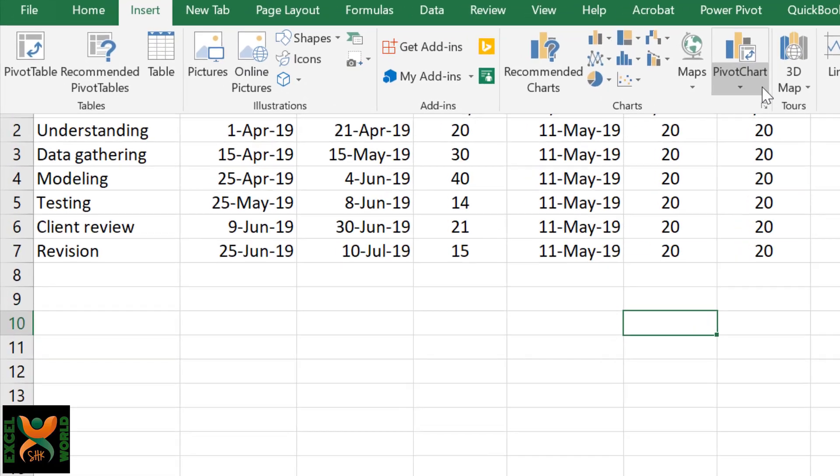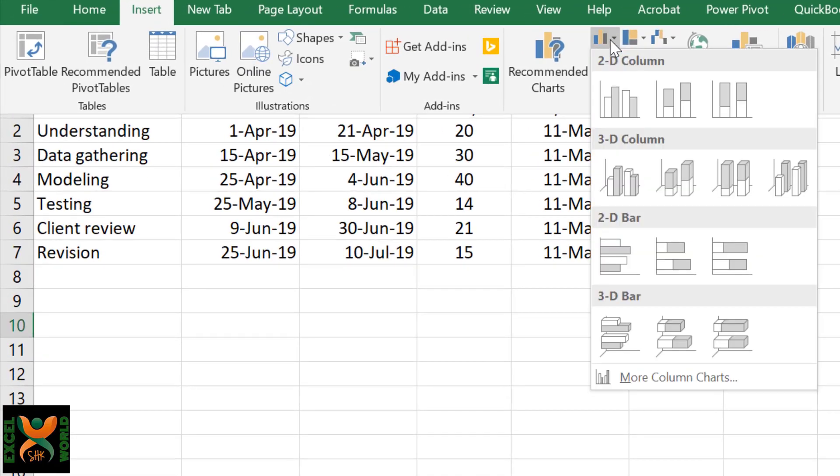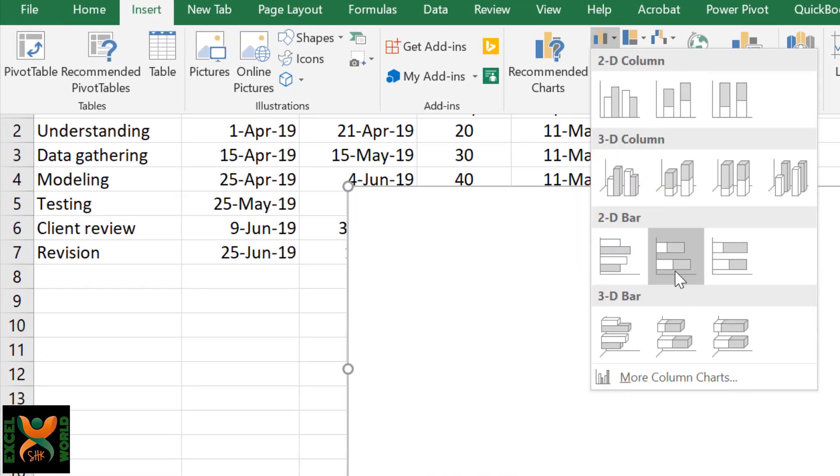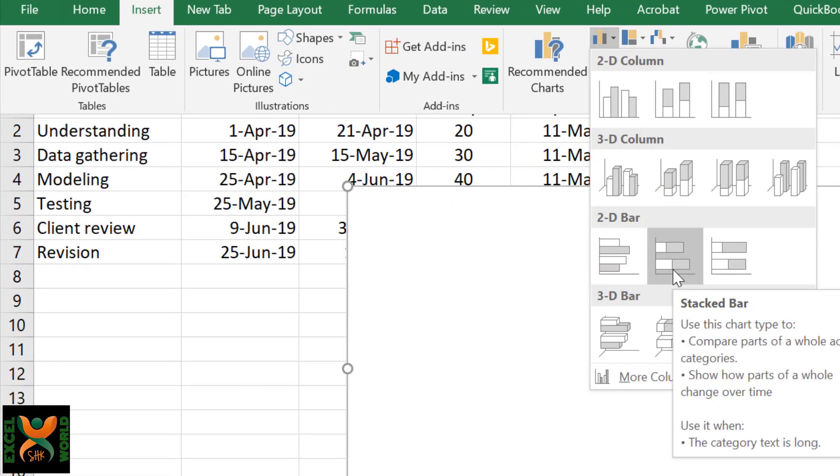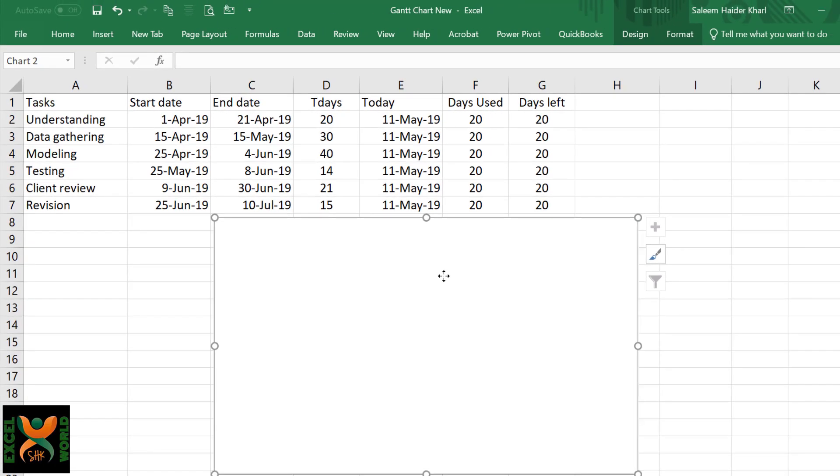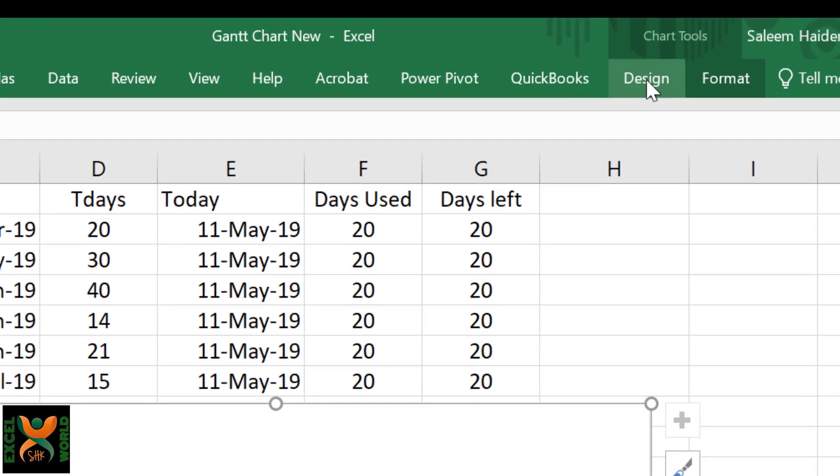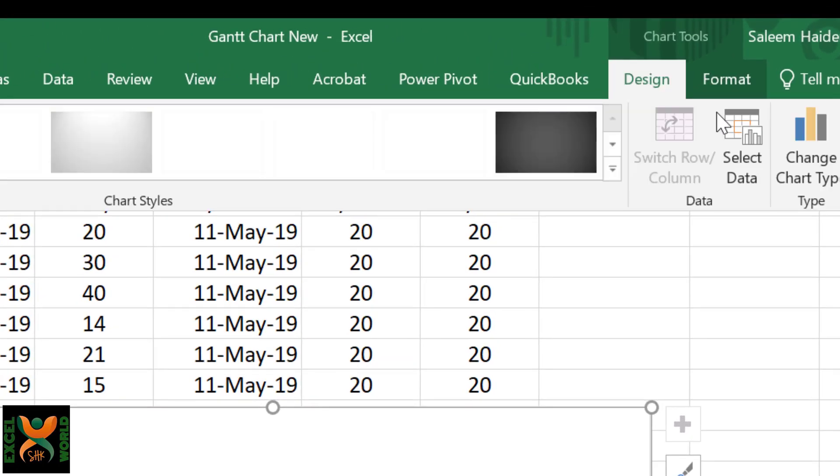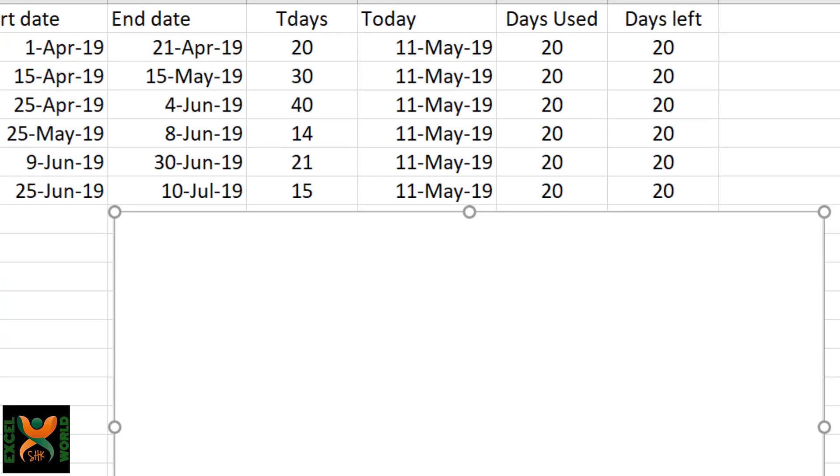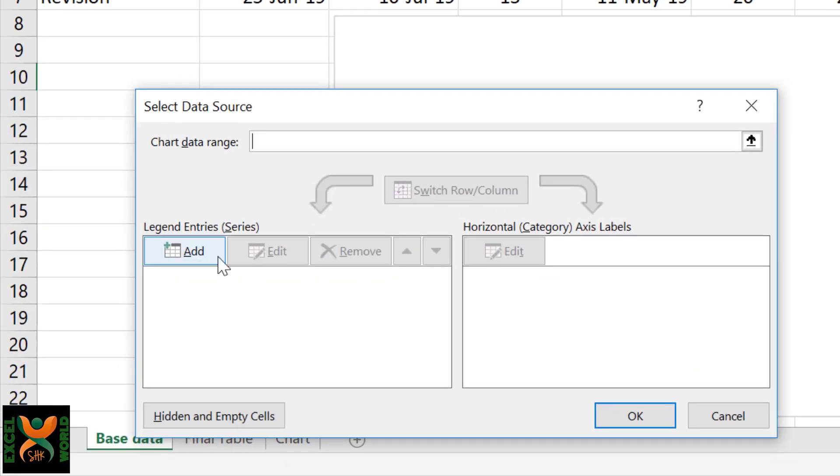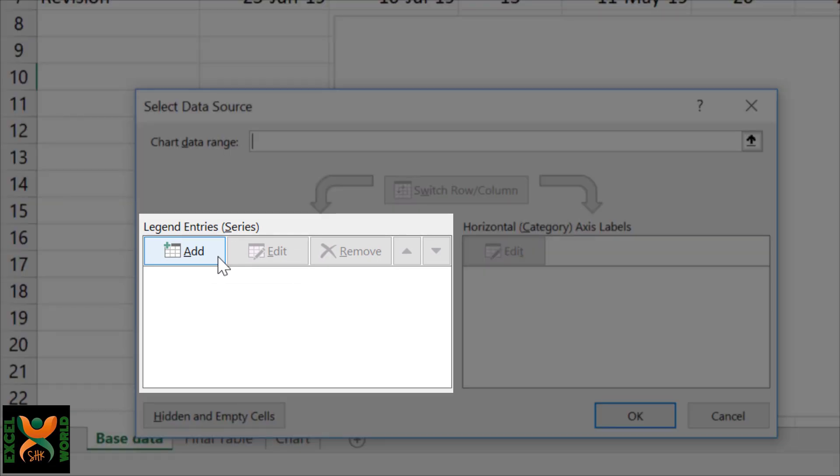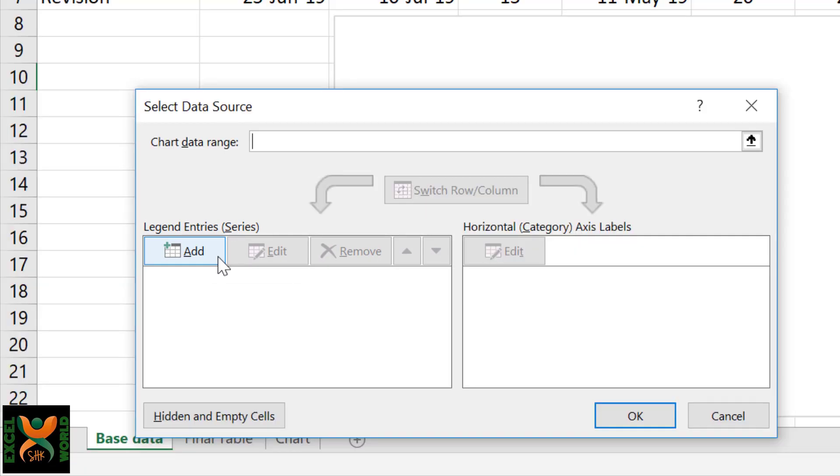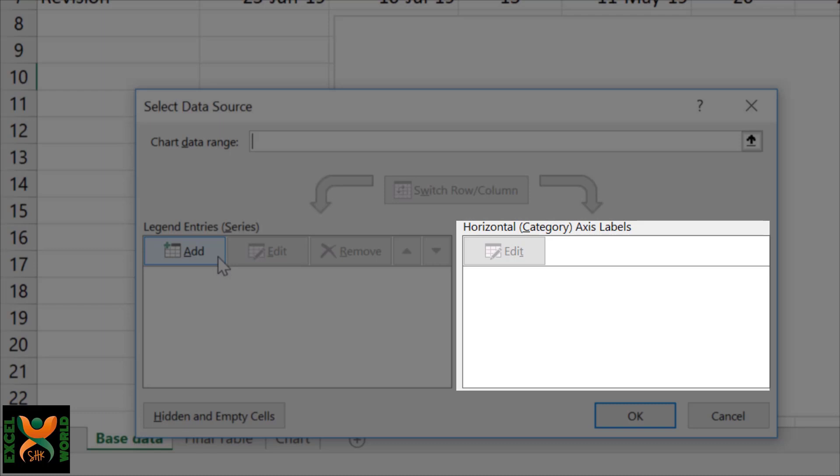Go to Insert, click stacked bar chart. Since we have not selected any data, it is blank. Select the chart, go to the Design tab, and select data. Here we are going to insert different series one by one manually and also insert the horizontal category axis.